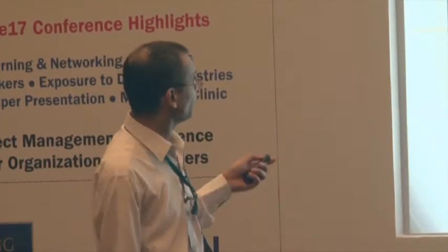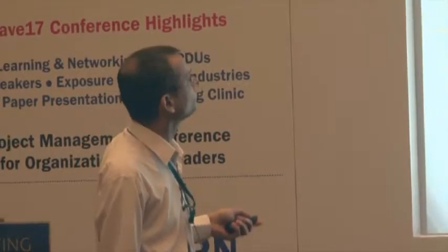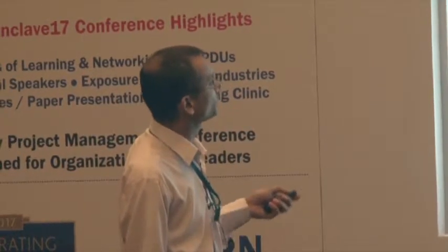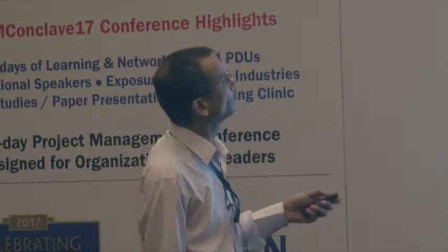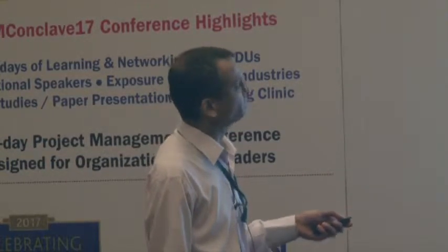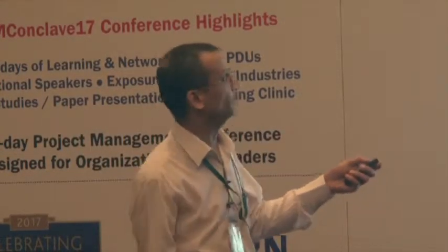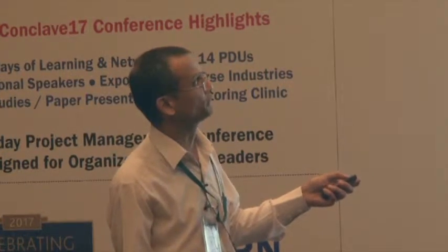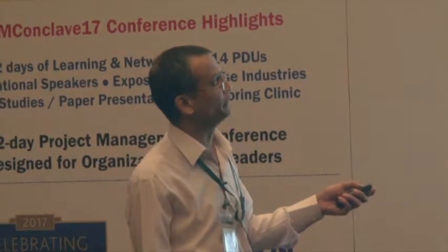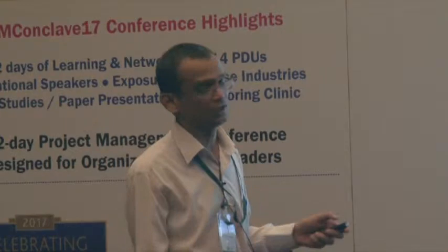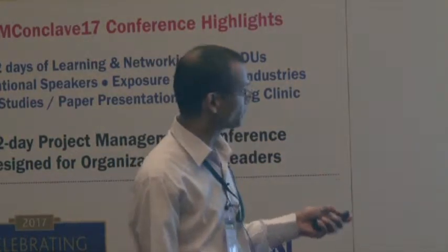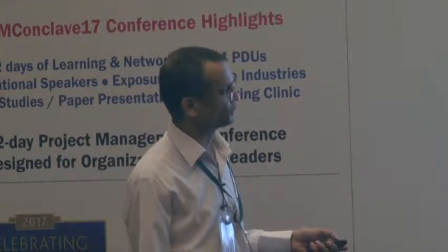In Excel, first all the activities have been listed out here. This is the deterministic scenario for the duration. And these are the predecessors. As all of you may know, it's early start, early finish, late start, late finish. And whenever the dates are matching, we say it's a critical task. And in the deterministic scenario, the project duration comes out to 47 weeks.